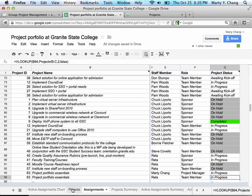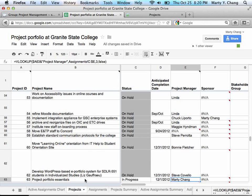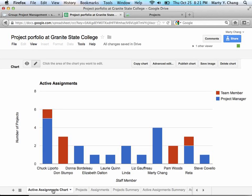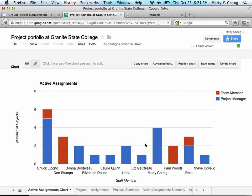So if you go back to the project, you're going to see that the Project Portfolio Essentials project lists Marty Chang as the project manager. And if you go to the active assignments chart, you'll notice that both RETA and Marty now have an extra project assigned to them.